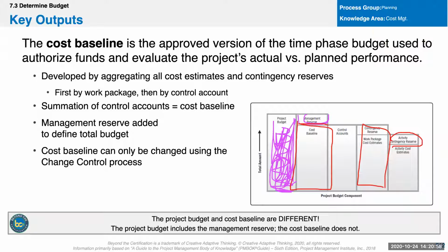So I know we typically say, oh, what's the budget? What's the budget on projects? And that's how we talk about it for the next couple of weeks while you're studying for the exam. What you typically know as your budget is really just a cost baseline. We never really know the budget because that's up to both the customer and management, right? The customer can determine how much more money they want to spend, and management will determine how much more money they want to spend. Does that make sense?